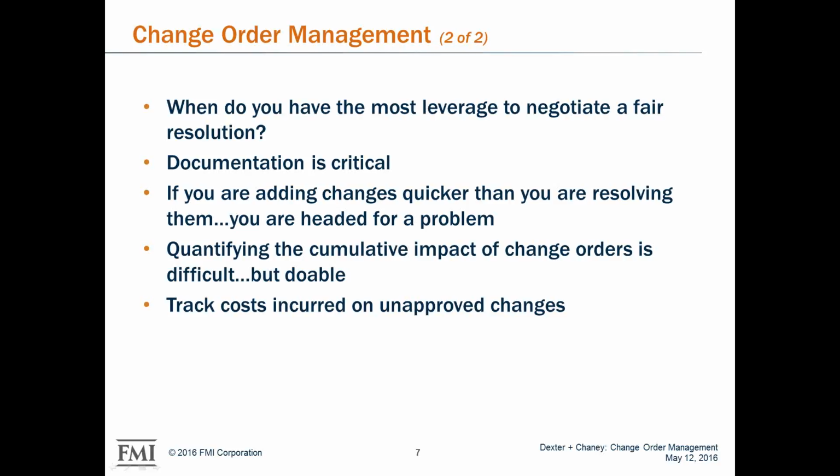And then last but not least here, we've got to track costs incurred on unapproved change orders. You've got to know what those are. You can't wait till the end of the job and try to figure that out and then bill it and cross your fingers and hope that you're going to get paid.